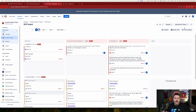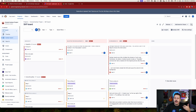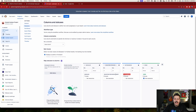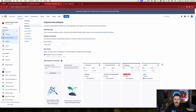Once you install Kanban Combined WIP for Jira — instructions and links are down below — you'll need to install a couple of browser extensions to get the full effect. Once that's set up, go into your board, click 'Configure Board,' then go to Columns. To group columns, type 'dev::' in the title of each column you want grouped together. Jira and the plugin will then know those two columns belong together.